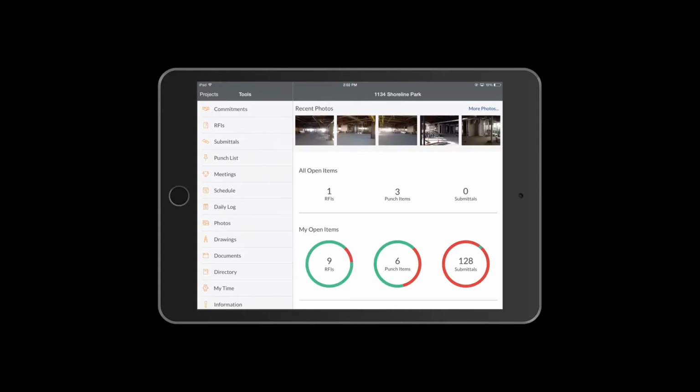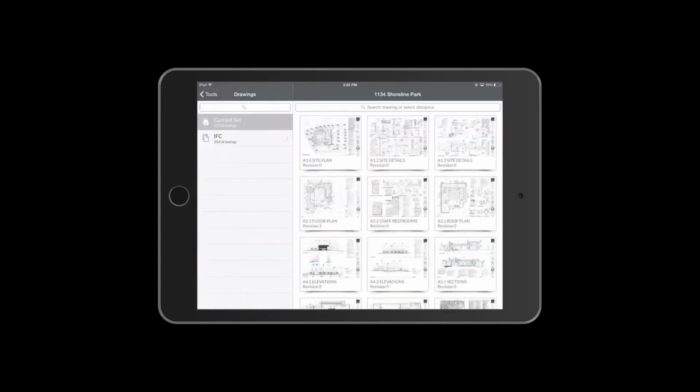This is why you're going to start the punch list process from the Drawings tool. Doing this streamlines several processes. It places the punch list item right on its location to prevent confusion for the subcontractor. It saves you time when creating it by eliminating clicks as you switch between the Drawings and punch list tools. Finally, it saves you time down the road as you'll be able to use these markups to create your as-built right on your drawing.